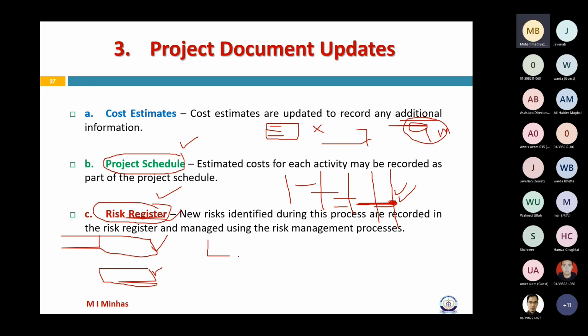We would like to write it down somewhere because now there's a high probability that we may miss the deadline. And there are many similar risks. For example, because our activities have moved forward, let's say the month of June is falling somewhere here when we have to do procurements.